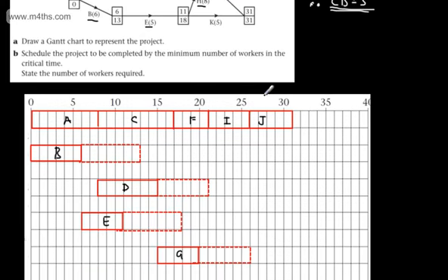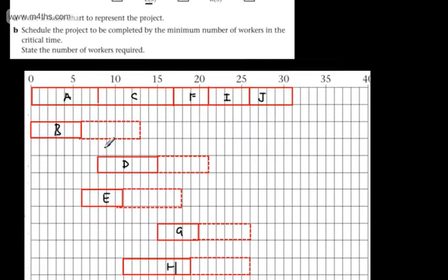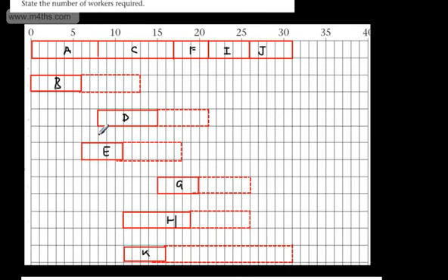So in the exam questions, they're not going to give you anything that's going to take 40 minutes and a lot of playing with. Most exam questions will give you a fair bit of scope. We were given the guidelines, but we don't have to ultimately play by them. We just have to have some appreciation of them. So let's just recap those. We use the first available worker. If we have a choice of activities, we take the one that has the earliest late event time.